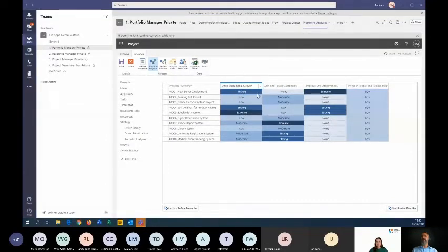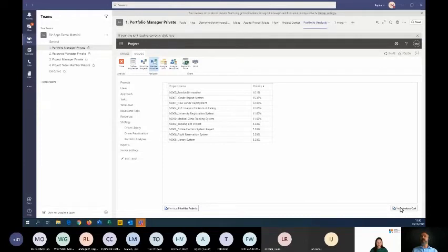And the result of doing this for each project allows you to identify a priority score for each of the projects, which takes into consideration the driver prioritization as well. So you end up with this prioritized list of projects that you can then use in your cost analysis.